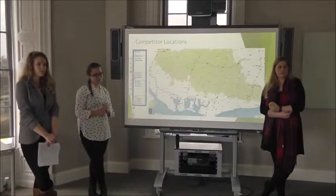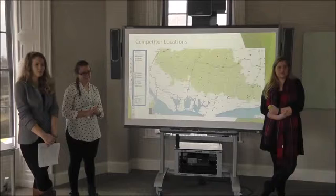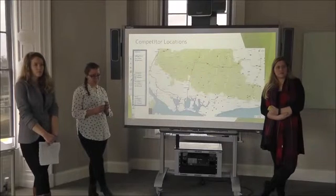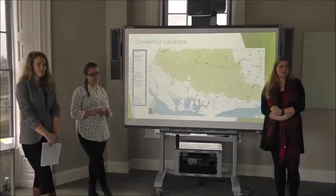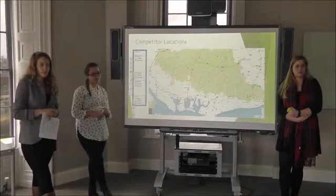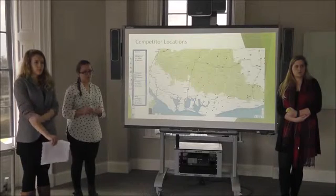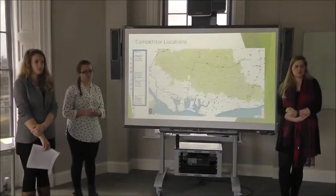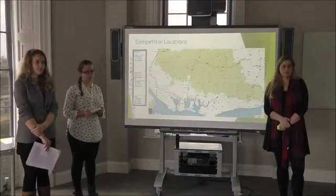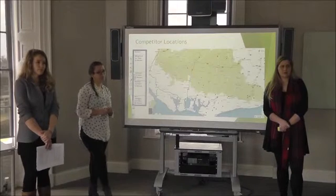Be careful with the project timelines. The first thing you've got to get from CDC is planning permission. And CDC will say yes one minute and then turn around at the planning stage. Over the last 6 months, the amount of planning appeals I've personally got involved with my businesses is growing. I was at a vision meeting last week with CDC and they were talking about what they need to improve, and I said planning, because my businesses are going out looking for planning permission for this type of activity. They're going to the planning officer in the context of the economic development strategy and being told that's a really good idea. And then they get to the planning stage and they're turned down. So one of the risks is refusal and going to appeal. I think you partly mentioned that, but that's the bigger picture. That takes longer, and then the build takes slightly longer.